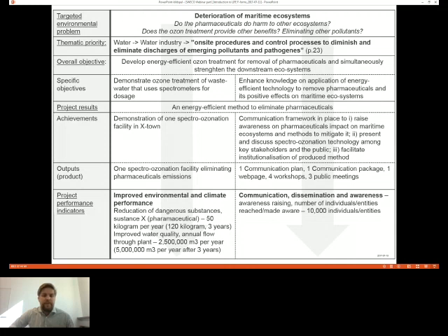You have to look into the application package and the Excel file, which describes the different project performance indicators. Those should be described on the end of the project, and the results, or the indicators, should be estimated within a period of 3 or 5 years after the end of the project. So it's important to remember that actions should somehow continue after the end of the project too, and that's why you need to write the afterlife plan during the course of the project to explain how it continues.